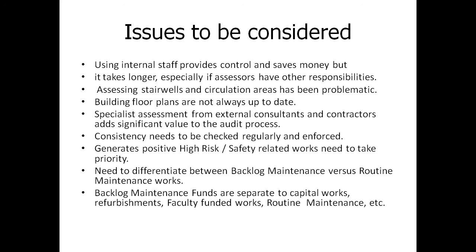Also, the consistency from audit to audit needs to be kept regular, and it also needs to be consistent. So that's often difficult if you've got different people providing you with data. And making it clear, really, with what is high risk, and being consistent with that type of rating. A big issue I always find is being able to definitely determine what is backlog maintenance and what is a part of the routine preventative maintenance, and being clear in your mind which is which.